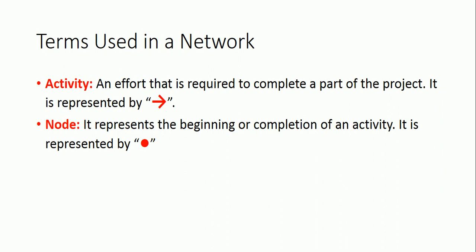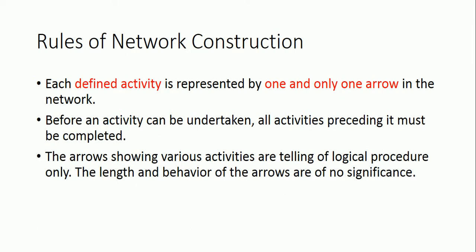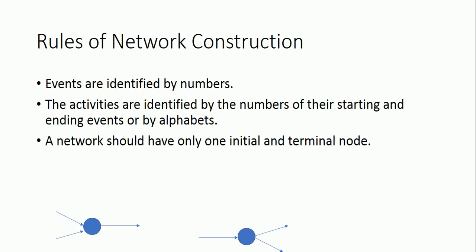Each activity is represented by an arrow in the network. A node represents the beginning or completion of an activity. Each defined activity is represented by one and only one arrow in the network. Before an activity can be undertaken, all activities preceding it must be completed. The arrows showing various activities indicate logical procedure only — the length and direction of the arrow are of no significance. Events are identified by numbers; activities are identified by the numbers of their starting and ending events or by alphabets. A network should have only one initial and one terminal node.